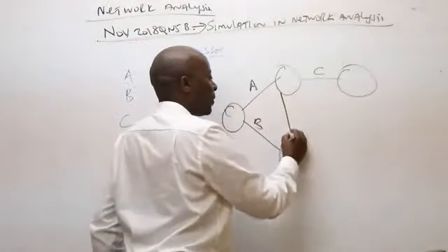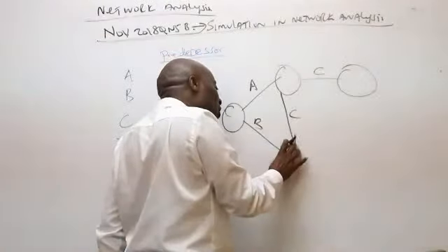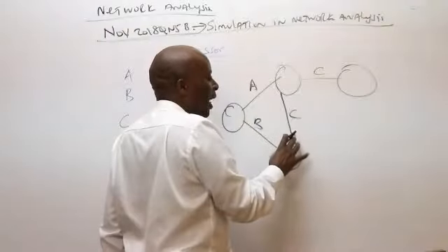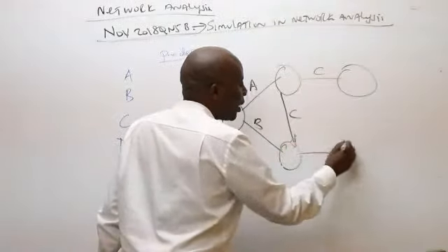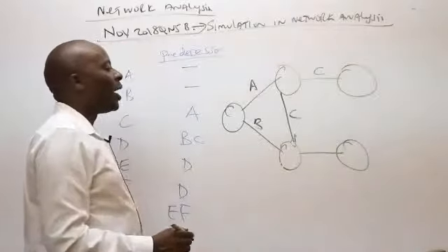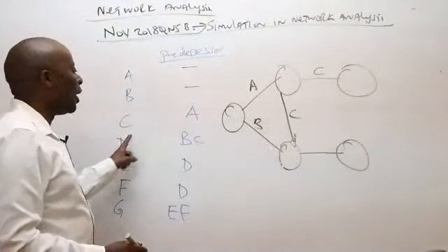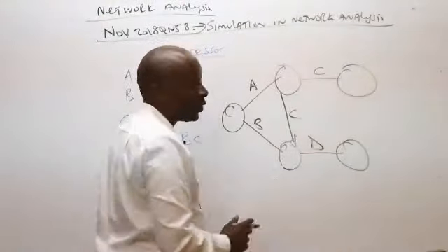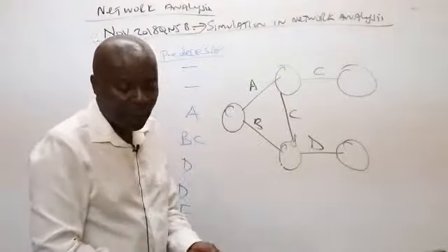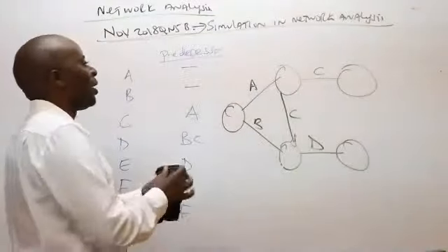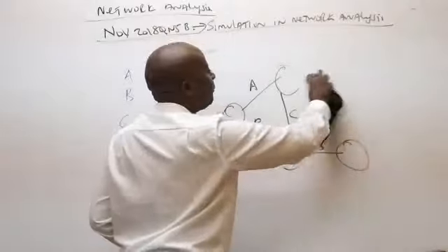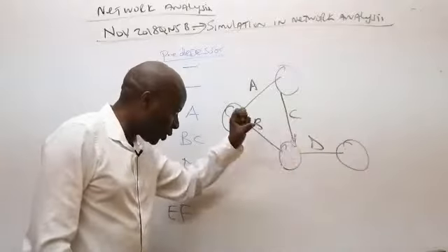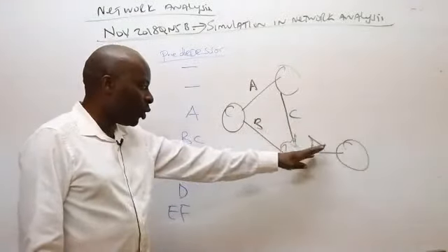You can come and drop C there, so that now this node signifies the end of B and C. After the two have ended together, now you can come and pull an activity called D, which comes after B and C. Now I need to comfortably rub the old C. That's D, which is dependent on two activities ending jointly for D to start.